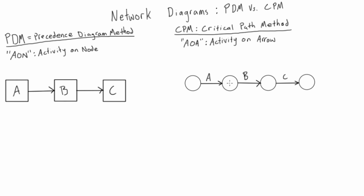Once we've completed the network diagram, we number the nodes generally going left to right: 1, 2, 3, 4. In a more complicated diagram there'll be ups and downs, but we use these numbers as what's called an IJ number. Activity A's IJ number would be 1-2, B's would be 2-3, and C's would be 3-4 — it's just which node the activity comes from and which node it leads to. One rule is that I has to be less than J, so you can't have a 3 leading into a 2.